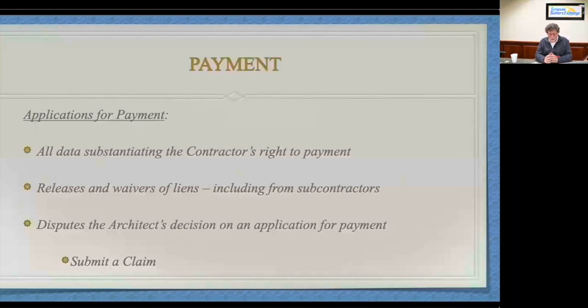for waivers and releases, which accompany a progress payment billing, let me please red flag the issue because this is extremely important. Very, very often we see the release and waiver documents that have to accompany a progress payment application contain language that can be very, very detrimental to the sub or the contractor that is signing the document. It's a big problem. Very often, we will see language with a progress payment release and waiver document that says that previous and open claims are included in this application for payment. That means you're waiving them unless they're in this number. Look for waiver and release language every time you sign a progress payment release document. Sometimes they end up releasing much more than what you think.